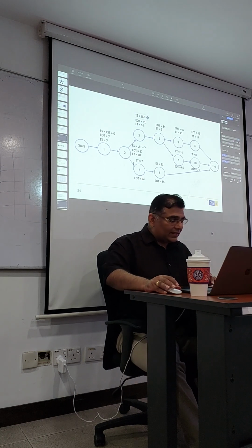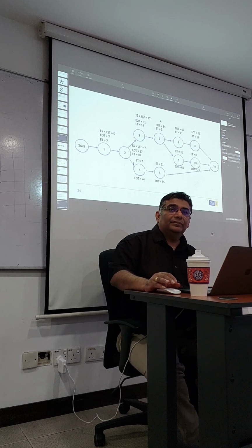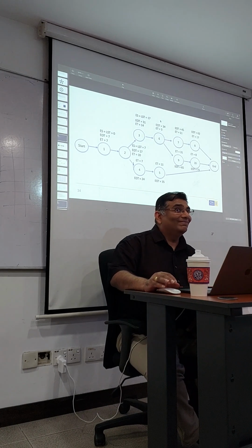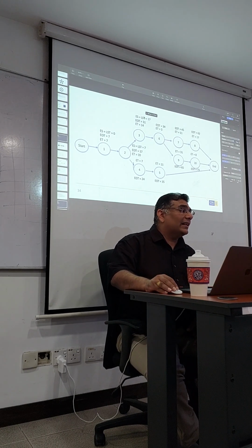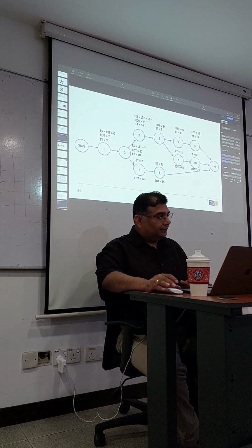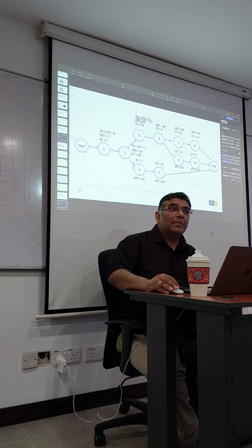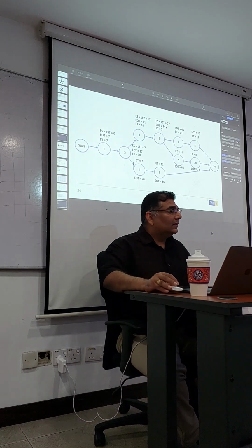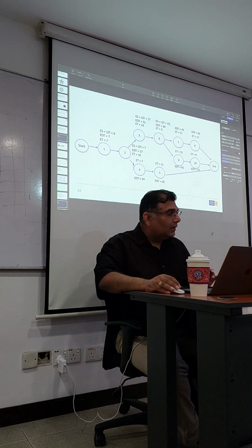Earliest start time and latest start time is the same, because it's the critical path. Remember we already said, critical path all the same, right? How do you know it's critical? Longest. Remember we talked about the longest path? The path that is not critical, maybe there is some crash. How do we give the crash, sir?